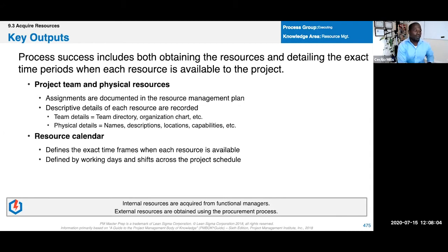So this is both about project team and physical resources. All right, and we'll have the descriptive details that typically would come from your resource breakdown structure, if you remember that term. That's where that would come from. And then resource calendars just say when a person is available. So for instance, most people are available Monday through Friday, 8 to 5, all right?